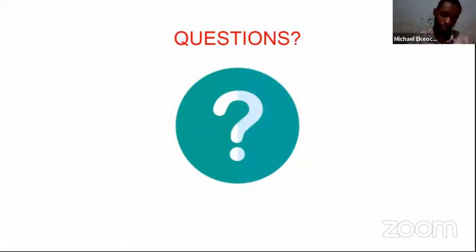Just to make things clear, I want to answer the first question that I asked. The people that gave me responses, you had a point. But in risk response, you respond to a particular risk with a strategy that suits it. If it is a risk that cannot be avoided, you either mitigate or you transfer. Like I mentioned earlier, I made an example using a car.